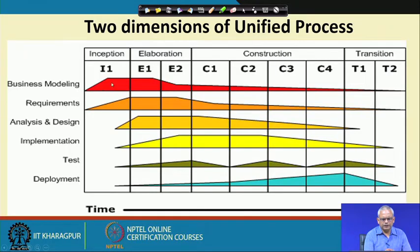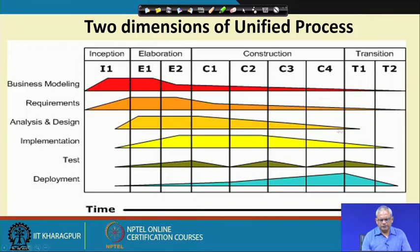For example, business modeling — that is the study of how the business operates — peaks during inception and elaboration. Requirement identification peaks during inception and elaboration and slowly tapers off. Analysis and design start during elaboration and slowly taper off. Implementation peaks during construction and to some extent during elaboration, then tapers off. Testing occurs all through, and the increments result in deployable software that is deployed at the customer site, but deployment peaks during transition.